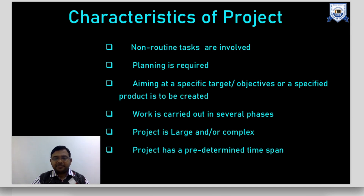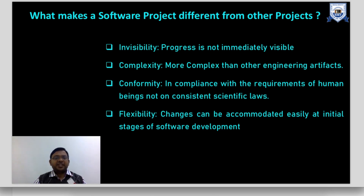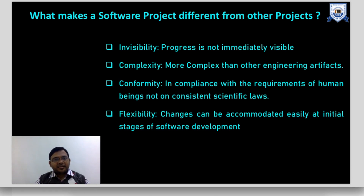What makes a software project different from other projects? First is invisibility — progress is not immediately visible. For example, in a bridge project we can see that part of the structure has been built, but in software, during requirement analysis or design phases, we cannot see any intermediate product being developed. Progress cannot be immediately visible at these phases.